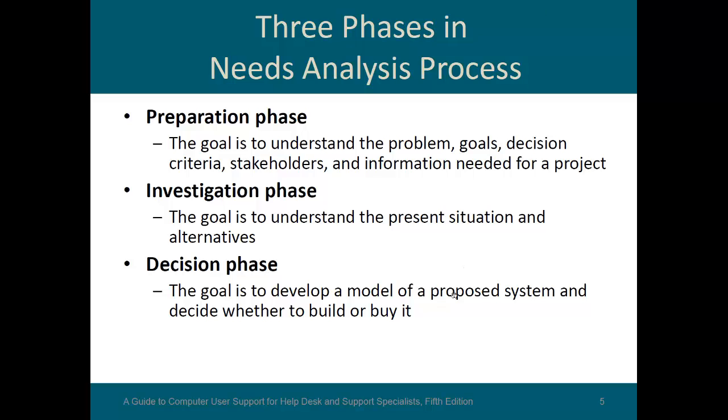There are three phases in needs analysis processes: a preparation phase, the investigation phase, and the decision phase. In preparation, the goal is to understand the problem, goals, decision criteria, stakeholders, and information needed for a project. These are all covered in the Project Plus certification mentioned in the last module. In the investigation phase, the goal is to understand the present situation and alternatives. And in the decision phase, the goal is to develop a model of a proposed system and decide whether to build or buy it.